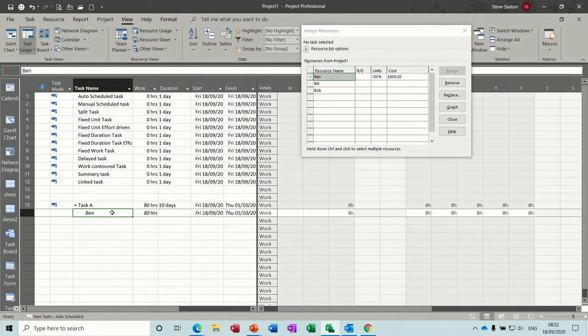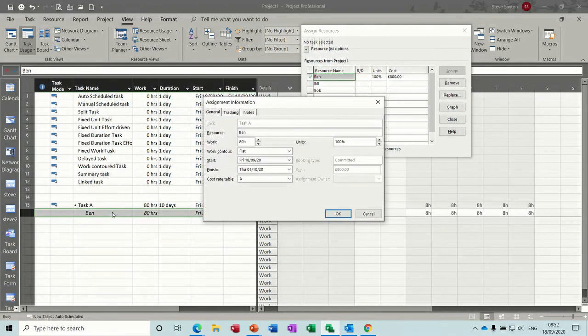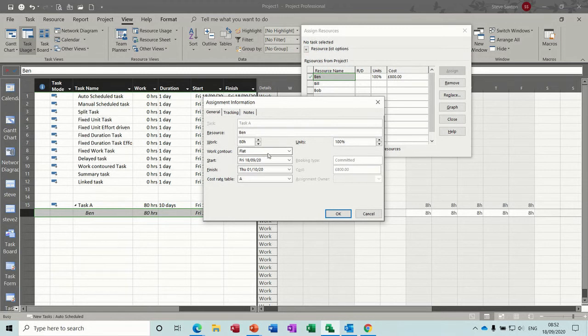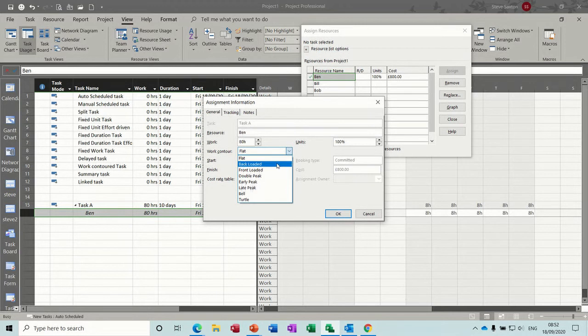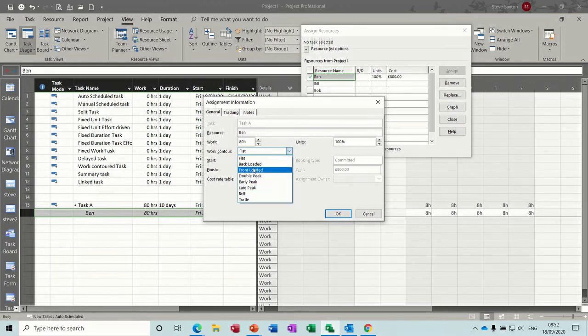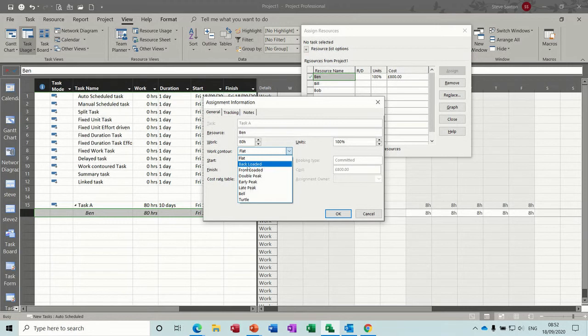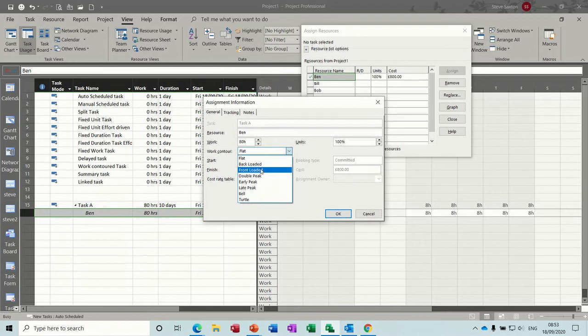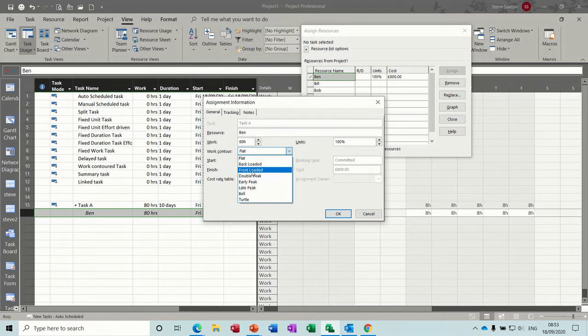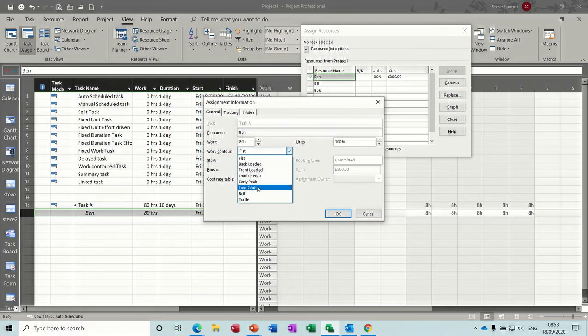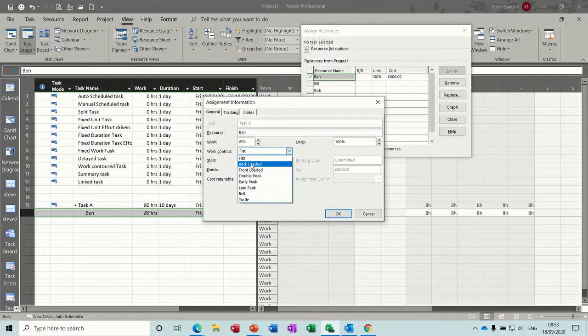Now if I double click on Ben, you've got a work contour which is default of flat, but you've got several options in there that you can select. Now these are all preloaded scales, if you like. This is where you don't really know how long a particular task would be. So you've got like a backloaded task, you just want to get some figures so you can get a budget together for your project, say if it's two years in the future. Or you might have a late peak, so the project manager might not do anything until near the end sort of thing. And I'll just show how it works.